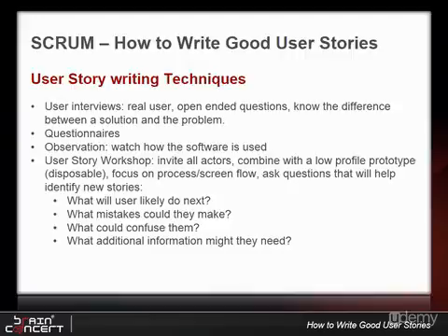Write close stories that can be accomplished. Balance the six attributes of a good user story. Create constraint stories, documenting non-functional requirements, and write acceptance tests. Size the story to be implemented in the near future. This can be planned and implemented with small effort. Keep the user interface out as long as possible, with the exception of course when the user interface is important to the success of the product. Not all requirements need to be user stories: technical interfaces, user interfaces and so on.